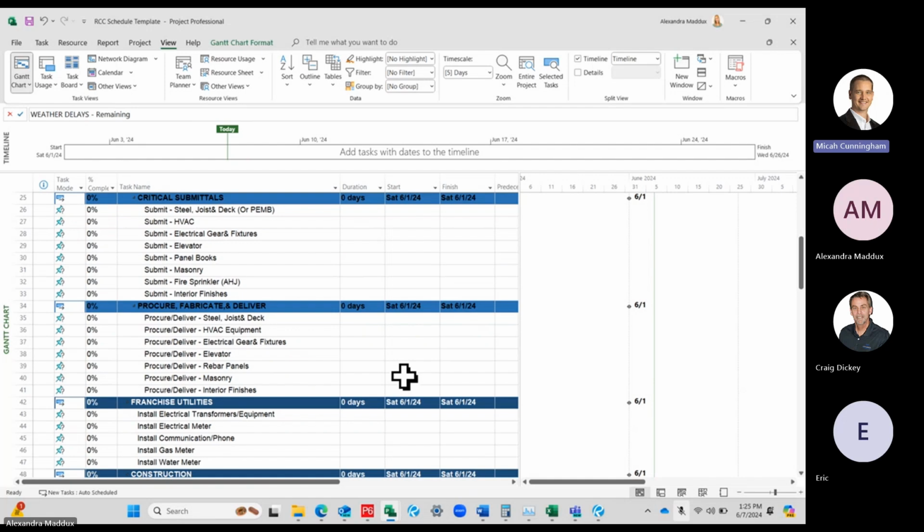Importance of reviewing the critical path. That's the next overview topic. For delays, you want to know what's critical, but you also want to know what's almost critical. Even though your switch gear is delayed and that's your critical path, you still want to know what's delaying other activities, because if your subcontracts are written where they have to meet a certain duration, then as soon as they exceed that duration, they're pushing out the next trade. So even if it's not critical, it's critical to them.